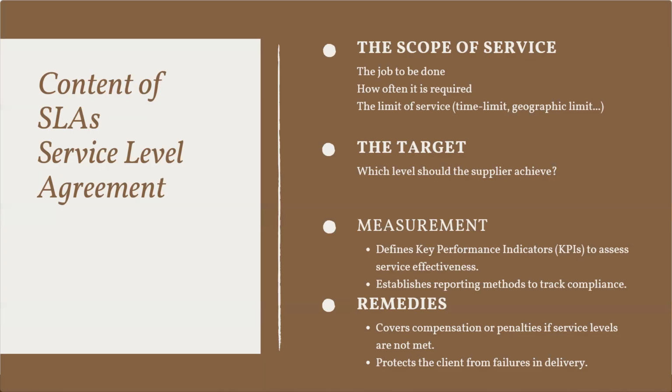The SLA should refer to that KPI and not reiterate the KPI here. And for SLA, if you want it to be more flexible, we can include the part on adjustment or variation of SLA as a part of this agreement.